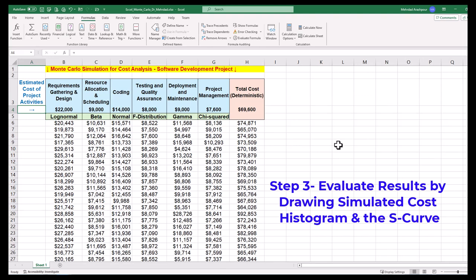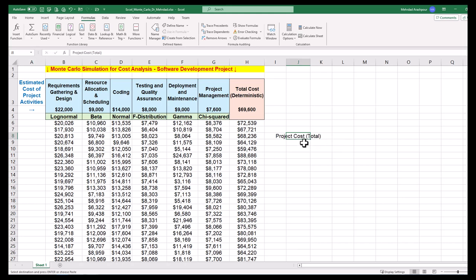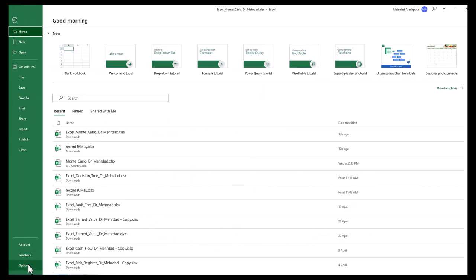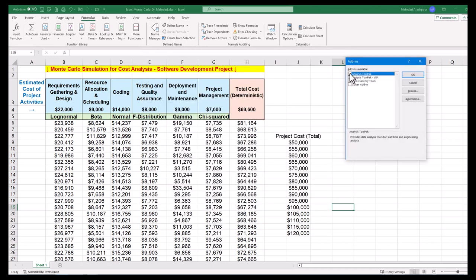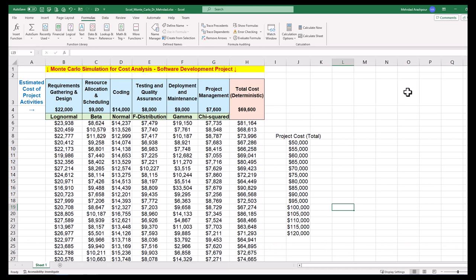Step 3 is to evaluate results by drawing the simulated cost histogram and the S-curve. Simulated project costs range between $50,000 to $120,000. Enter this range with an interval of $5,000 to generate proper bins for the histogram. To draw professional histograms, activate the Data Analysis ToolPak in Excel: go to File > Options > Add-ins, select Excel Add-ins, click Go, and check the Analysis ToolPak box. To stop automatic recalculation, navigate to the Formulas tab, click Calculation Options, and change from automatic to manual mode.